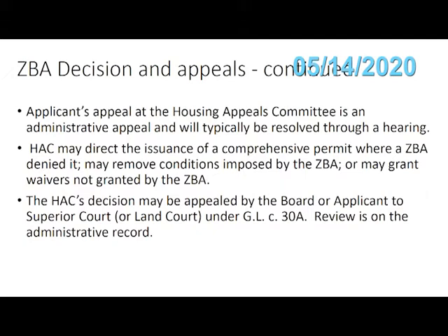Courts defer to them. Courts have shown very little sensitivity to cities and towns that disapprove comprehensive permit projects, and that's not meant to put any kind of negative light on it. It's just the way it is, and that's why cities and towns have to be very flexible and very pragmatic in dealing with comprehensive permit projects. But the thing that's worth mentioning now, even though it seems so in the weeds, when the Housing Appeals Committee renders a decision, it is appealed to the court, Superior Court or Land Court, on the record that's created at the Housing Appeals Committee, meaning the court does not hear new testimony. So the Housing Appeals Committee is a really important place for the town to defend its decisions.